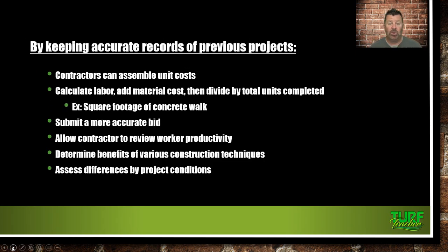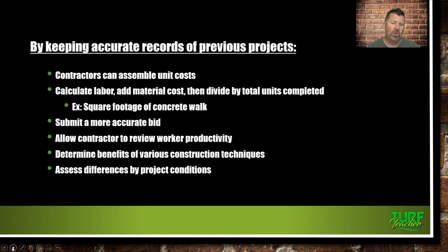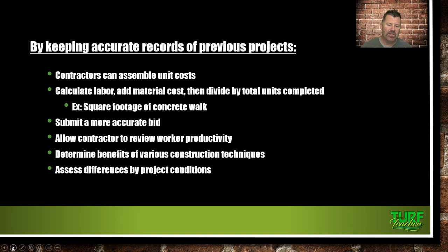By keeping accurate records of previous projects, contractors can assemble unit costs — calculate labor, add material costs, and divide by total units completed. For example, square footage of concrete. This allows you to submit more accurate bids and also lets you review worker productivity. If you compare to past jobs and new employees aren't keeping up, it may be time to make changes. You can also determine the benefits of various construction techniques and assess differences by project conditions.